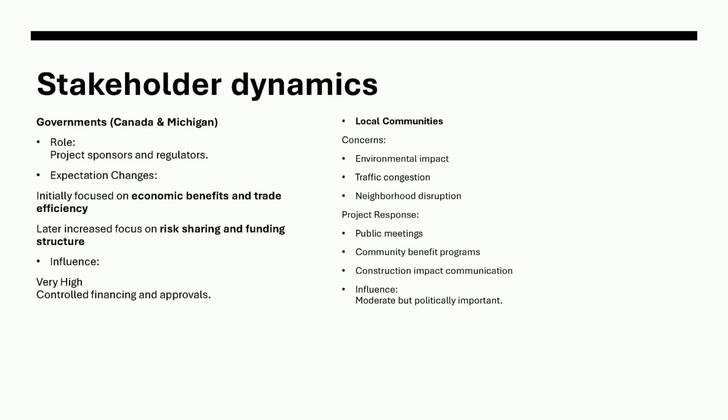Then we had local communities. Their concerns centered on environmental impact, traffic congestion, and neighborhood disruptions, things like increased noise or changes to daily life during construction. The project team responded proactively with public meetings, community benefit programs, and clear communication about construction impacts as required by the agreement.